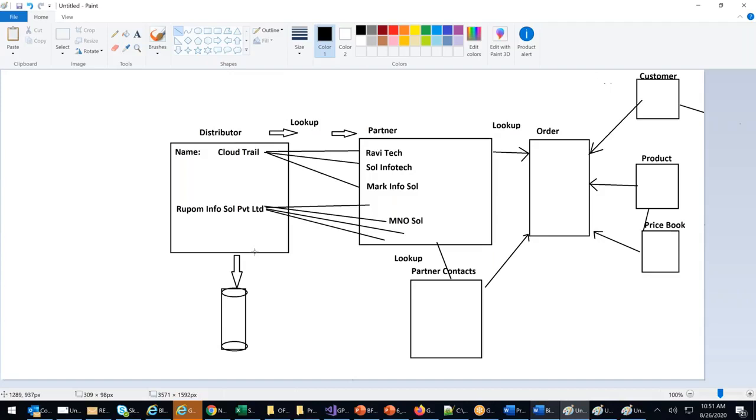Every team will have their individual documentation, right? And there'll be one master doc. From the master doc, statements of work will be created. If you remember those project classes I was telling you, PVD, BRD, business requirement document, project vision document, SOW. Why so many documents? This is the reason. Each team will get a statement of work. So Rupam, this is your next 1 month statement of work. I will go ahead and divide this among multiple people in my team, right? Who will do what? Able to catch the whole flow now?